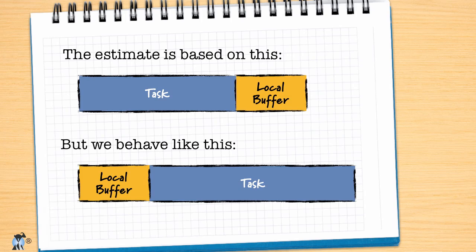Student syndrome is human nature, so it's not something we're going to want to fight. As we build up an Agile estimating and planning approach, we'll find that the short iterations of Agile help focus attention, reducing the impact of student syndrome.